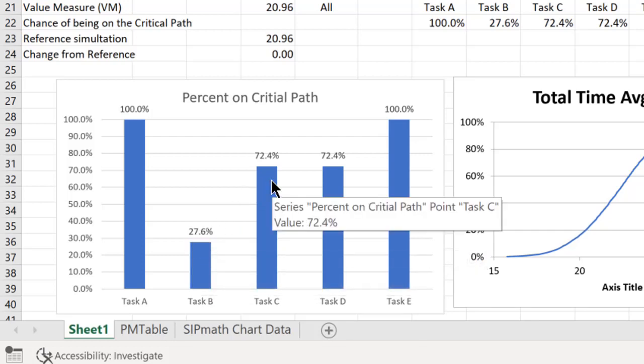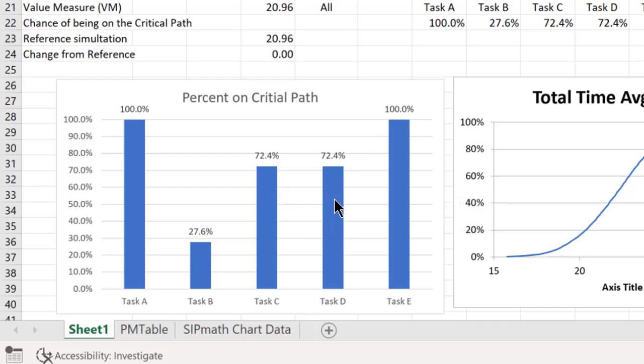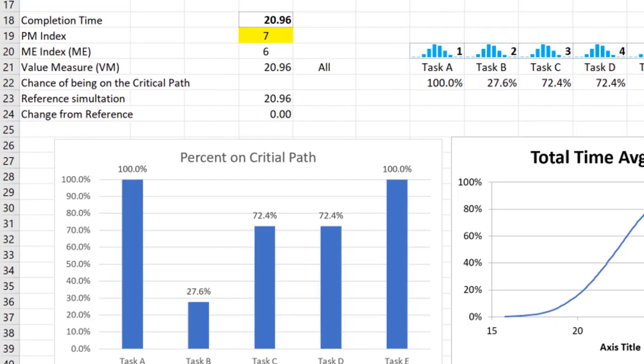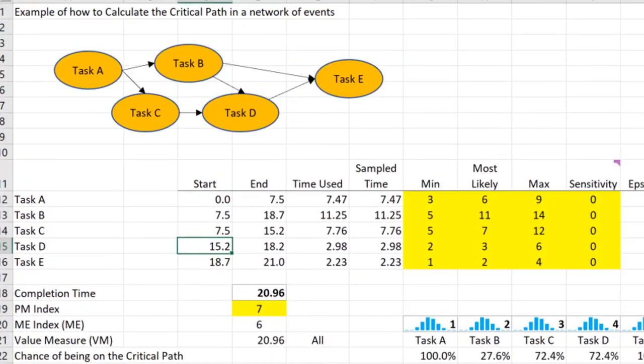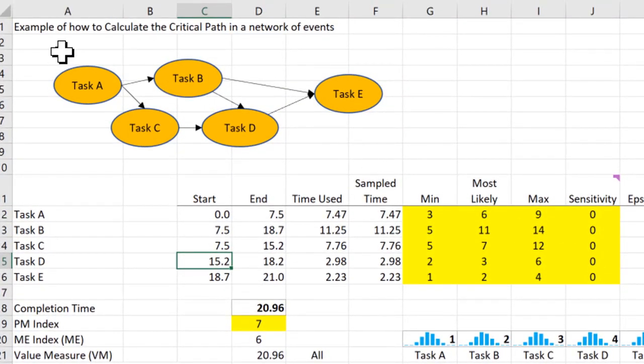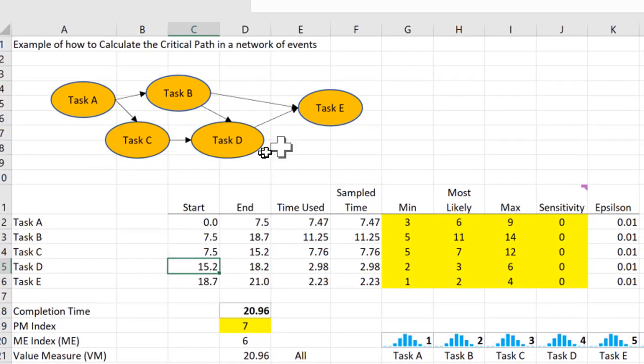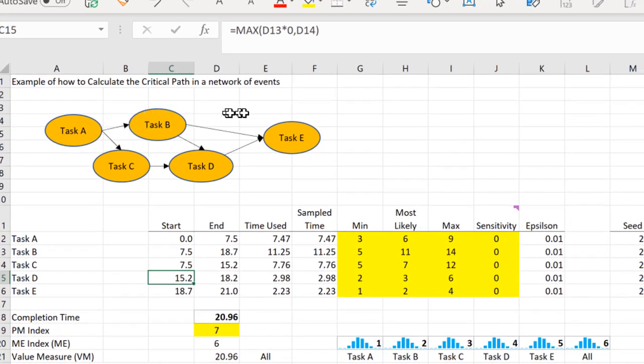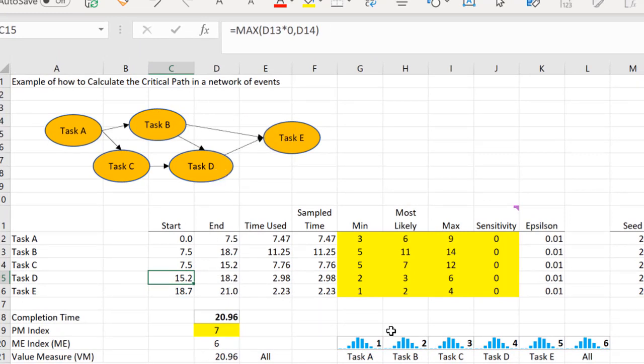And that's because now there's only two paths, one path coming this way and another path just going through here. So we can see how this critical path can be changed by just changing the network.